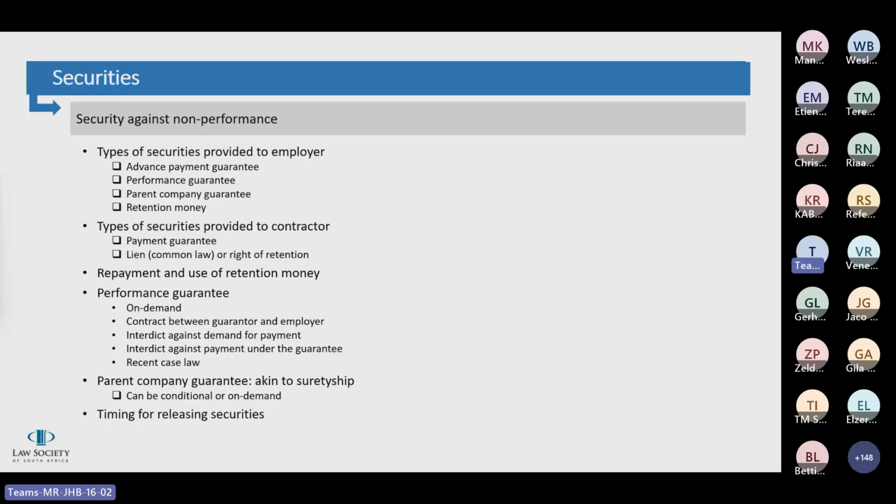The fraud exception falls within a narrow compass and applies where the beneficiary, for the purposes of drawing on the credit, fraudulently presents to the guarantor documents or information that make, expressly or by implication, material representations of facts which are to his, the beneficiary's, knowledge untrue. The party alleging and relying on such exception bears the onus of proving it. And that onus is an ordinary civil one, which has to be discharged on a balance of probabilities, but will not be lightly inferred by court.